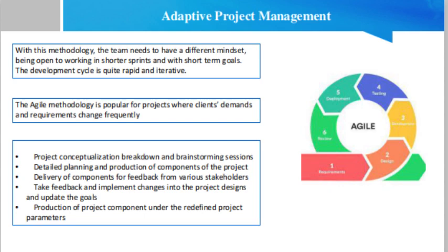By following an adaptive method, the final product may differ from the initial concept and make the overall journey more exploratory and innovative. There are various steps in the Agile technique which generally include project conceptualization, breakdown and brainstorming sessions, detailed planning and production of components of the project, delivery of components for feedback from various stakeholders, take feedback and implement changes into the project designs and update the goals,